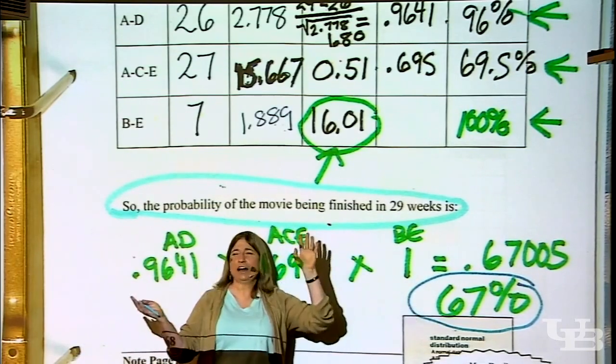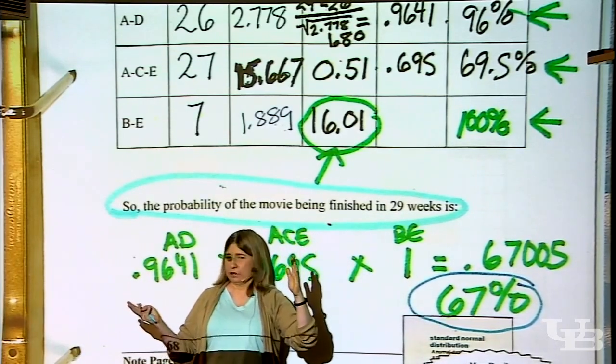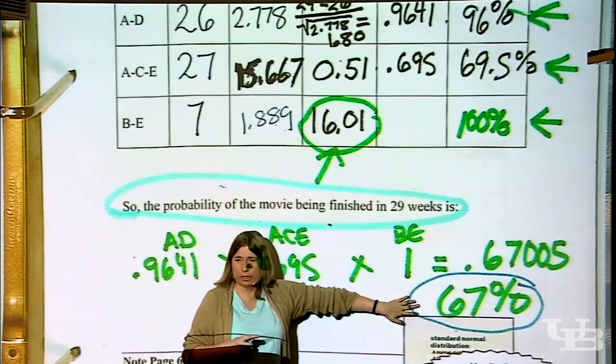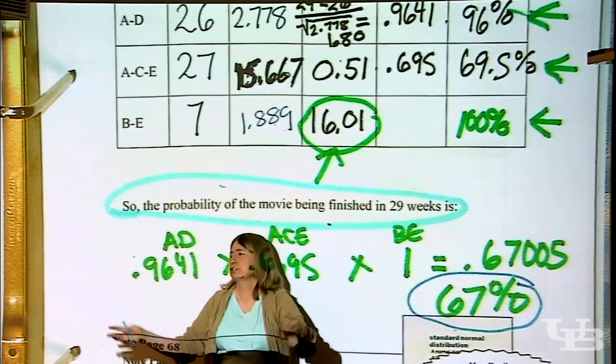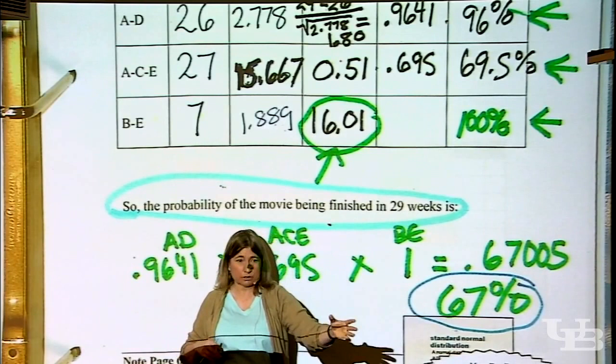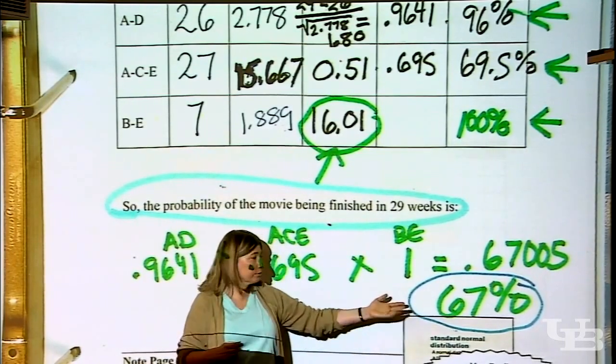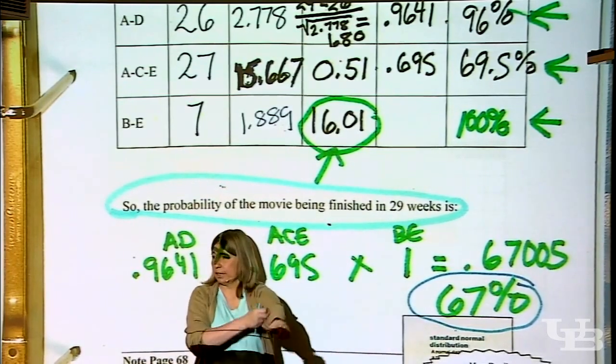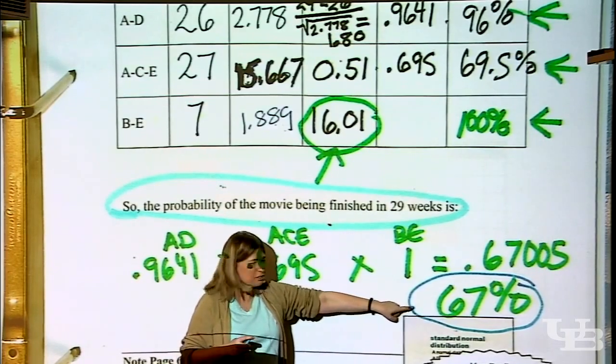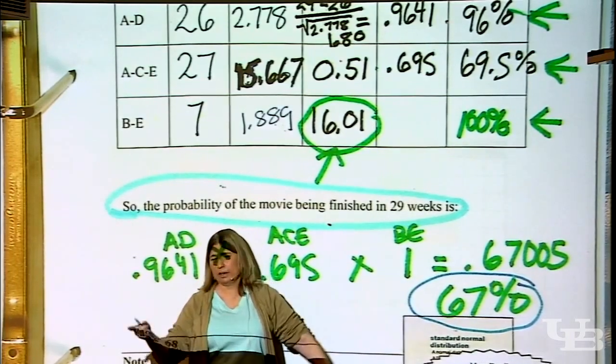It won't be so bad if we overrun the deadline by a week or two. So we're comfortable with this. We've got a 2/3 chance of actually making it, and we're not all that concerned about overrunning. Then we might say that. If we're looking at steep financial penalties, I would think that is too risky, right? We would pad it more.